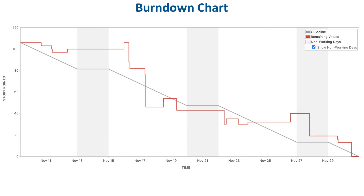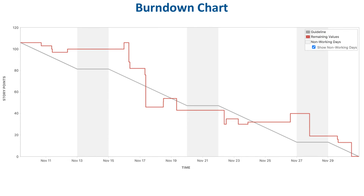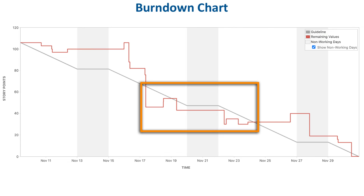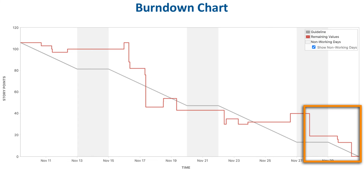Let's review a couple of real-life burndown charts. This was a four-week sprint, and it can hardly get better than this. The team planned to complete just over 100 points of issues, and at the end of the sprint they succeeded since the red line dropped down to zero. Over the course of the sprint, the red line nicely swirled around the gray line, never getting too far from it. It stayed above for the first week and a half, then a lot of stories got completed within two days and the red line fell below the gray line, indicating the team was progressing ahead of the linear speed. Then it stayed flat for a while, the team added some issues to the sprint, and eventually towards the end of the sprint the red line started going down again and ended at zero.